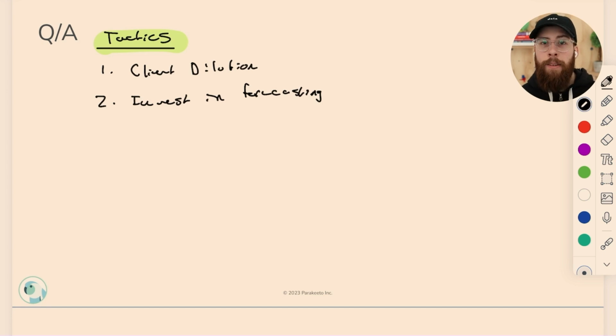And in particular around forecasting, the important consideration here is trying to separate bottom-up forecasting from top-down forecasting. And the mistake I see a lot of firms make here is they only have a bottom-up forecasting system, which means they take projects or work, they break it down into tasks, and they assign those tasks to individuals. And that's a great way to get an understanding of who's doing what for the next week or 2 weeks, and really looking at a granular and precise level of individual contributors and the things that they're working on.